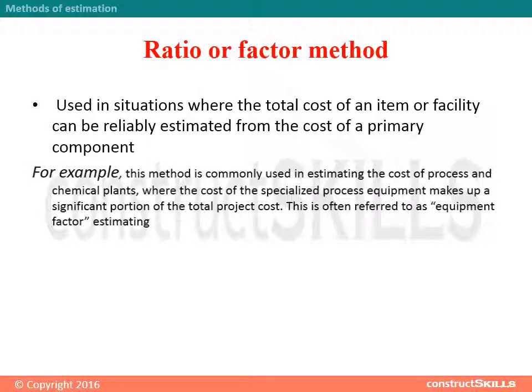The Ratio or Factor Method is used in situations where the total cost of an item or facility can be reliably estimated from the cost of a primary component.